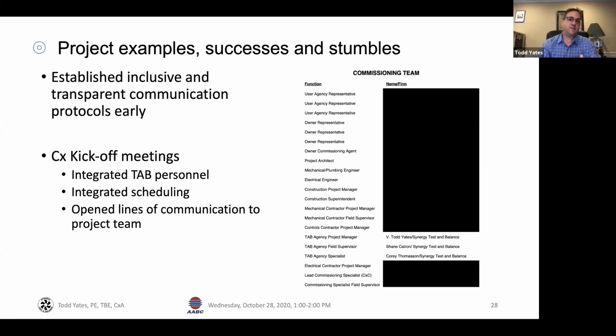If it's 3 weeks on site, you can't just assume it's all going to get done in 3 weeks. We were able to explain to them why we need to back up and give some extra time for that. There's bound to be things that we find that need to be corrected. There's got to be some time to come back and rebalance those things, or balance the things that weren't ready where we found issues. We were able to work that into the project schedule so that they understood when we needed to be on site and what needed to be done.